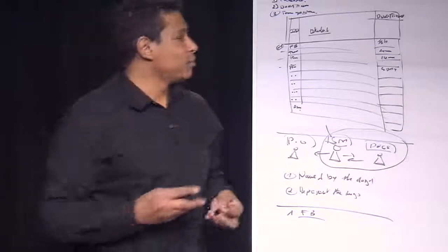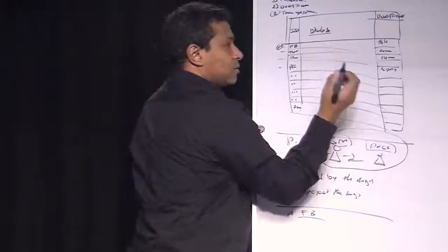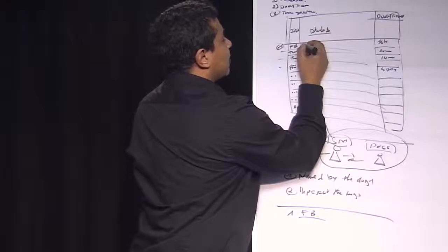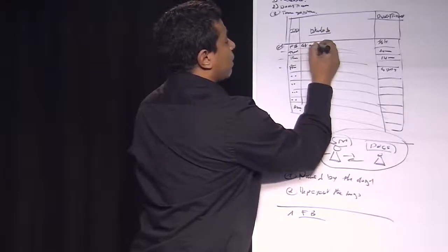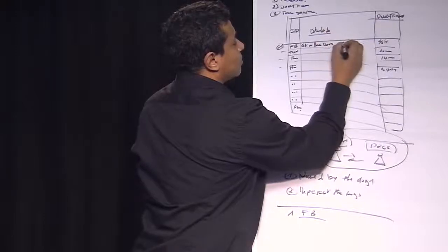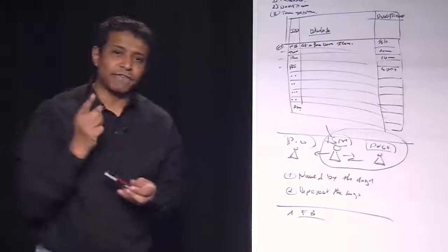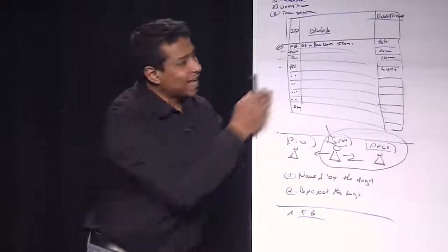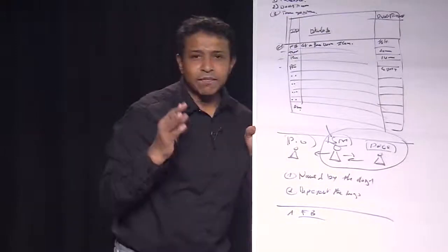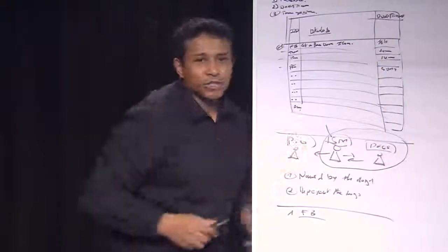So you have to pull some details about it: get a Facebook icon. It doesn't mean that I link my Facebook icon. It means that I get the Facebook icon. And the more precise I am, the more precise the duration is.